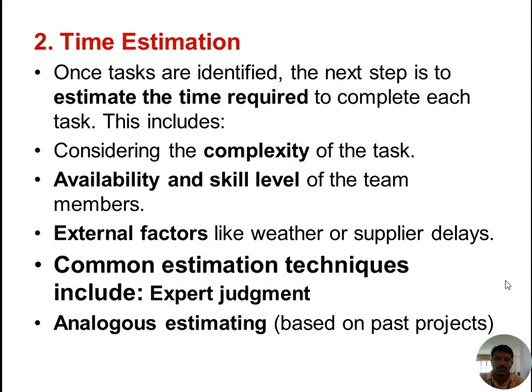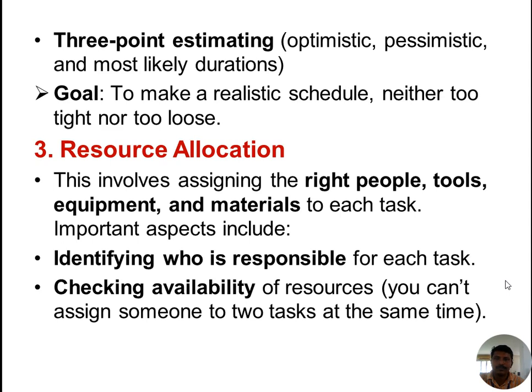Common estimation techniques include analogous estimation and 3-point estimation. 3-point estimation means optimistic time, pessimistic time and most likely time. It means the PERT.